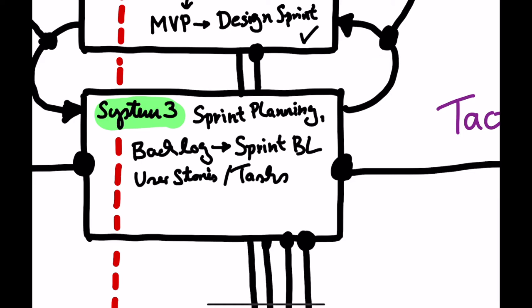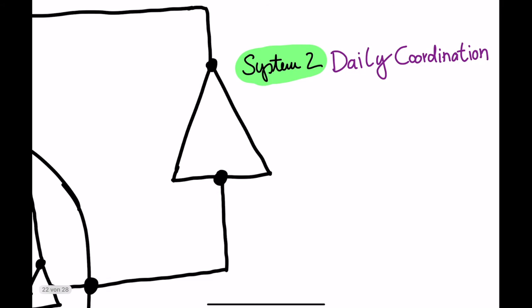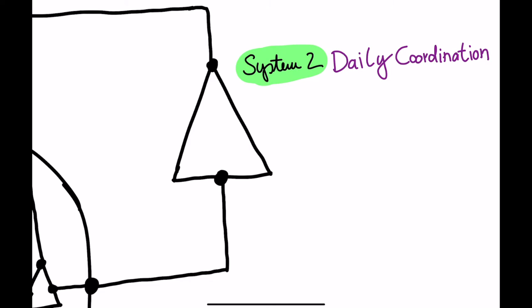And this is already maybe enough to start then their first sprint. They know what they're going to do. So they have to go into their daily mode. And here the System 2 comes into play. And what does System 2 do or provide? Well, it helps on a daily basis to coordinate. And they use the usual stand-up logic. For 15 minutes it should be enough to understand what is happening around us. Are there any surprises, positive or negative surprises? And what can we do in order to achieve, to burn down our sprint backlog, the tasks within them?